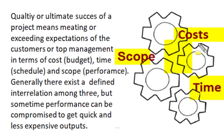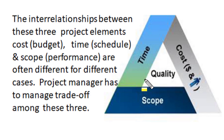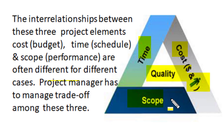Generally, there exists a defined proportional relation among these three project criteria, but sometimes depending upon available opportunities, one or two performance criteria can be compromised or enhanced to get desired results — such as quick and less expensive outputs. When we enhance time and cost criteria, we have to compromise performance or scope. Often in varying circumstances, different project cases choose different combinations of these three criteria, and a project manager has to manage the trade-off among cost, time and scope.